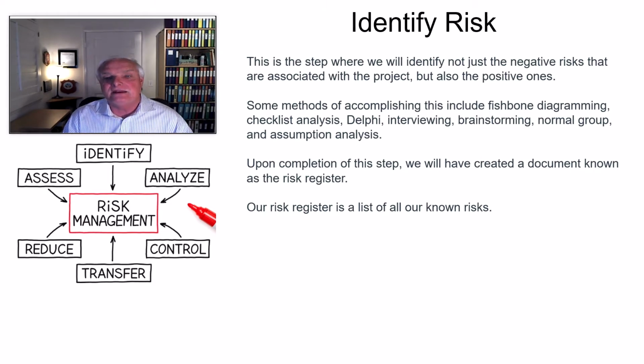What are some of the negative risks that could happen to the project? There's a variety of different methods for that. You can use fishbone diagrams, and once you create a fishbone diagram, it gives you the ability to look at it and say, root cause, this is what could happen. What would be our way to mitigate that or eliminate that? Some of them can be eliminated, some of them can be mitigated, others can be exploited depending on if it's a positive risk. So there's a variety of methods for trying to identify those risks.